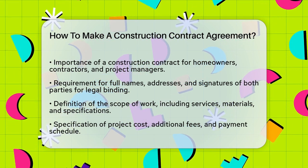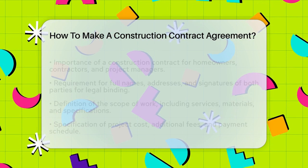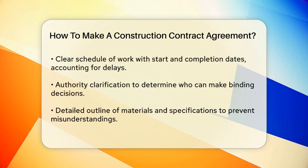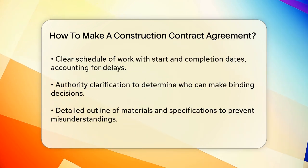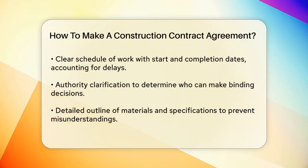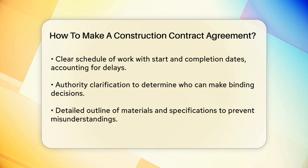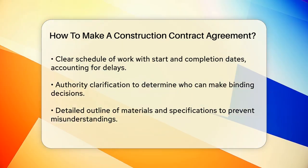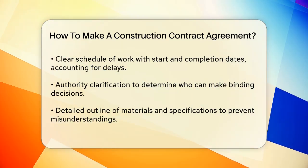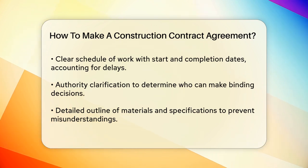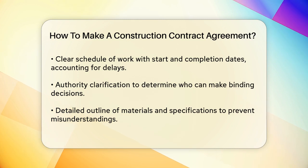The project cost and payment terms are also critical. This part of the contract should clearly state the total cost of the project, any additional fees, and the schedule of payments. It's important to specify how payments will be made, such as through monthly installments, and what methods of payment are acceptable, like cashier's checks or credit cards.